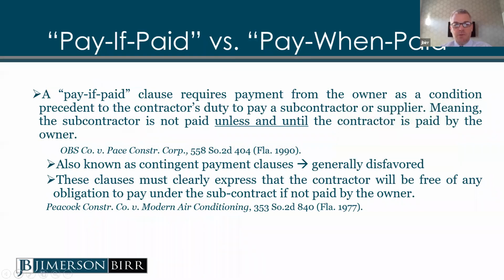So the difference between pay if paid and pay when paid, I've cited a case here, a pretty famous case in Florida in the construction context, but there has to be very specific language in your contract in order for a pay if paid provision to be enforceable, because courts don't like to enforce that kind of situation. If you've done the work, you should get paid for it. You shouldn't have to wait for some contingency to occur in order for you to get paid for your work.